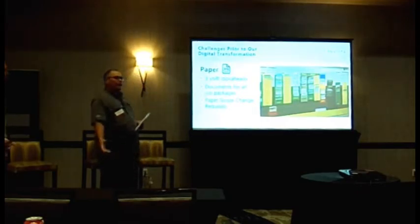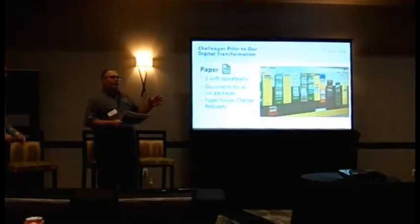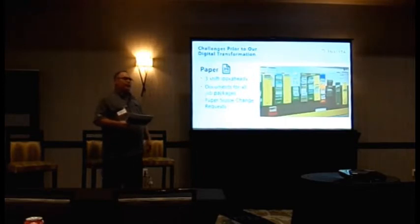Okay, the 3-shift look ahead, we would do a paper copy at 5 a.m. The scheduler would come in, print up copies, and hand them out to the contractors. They have to fill them out as they go through the day, and get to 3 p.m. and say, okay, guess where you're going to be at 5 o'clock. Fill it out, get it back to the scheduler so you can have that next 2 hours to manually update every task that y'all have done today.